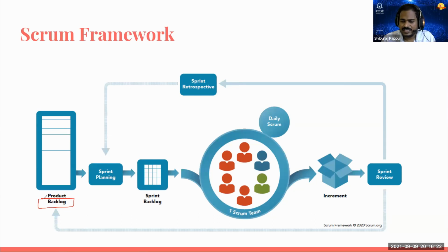There are different meetings. So the meetings are done with the customer, obviously, and based on that, the product owner finds out what all things the user needs, and based on that he creates the epics and the user stories, right? So once that is done, that will be called a product backlog. Okay, so this has to be designed first.